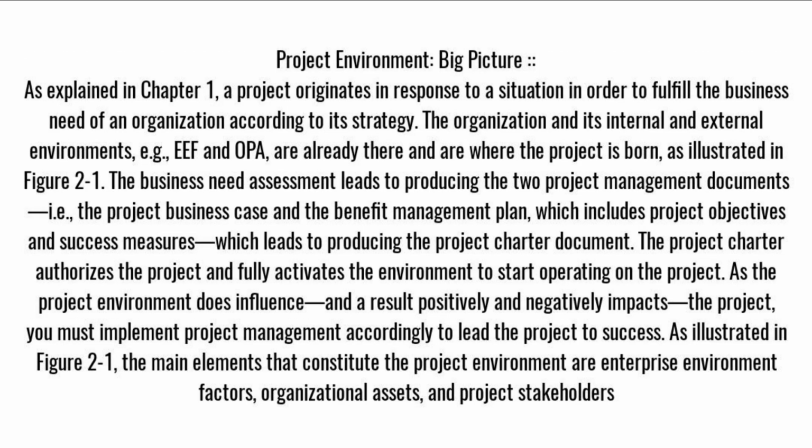Project environment, big picture. As explained in Chapter 1, a project originates in response to a situation in order to fulfill the business need of an organization according to its strategy. The organization and its internal and external environments, for example EEF and OPA, are already there and are where the project is born, as illustrated in Figure 2.1. The business need assessment leads to producing the 2 project management documents, i.e., the project business case and the benefit management plan, which includes project objectives and success measures, which leads to producing the project charter document. The project charter authorizes the project and fully activates the environment to start operating on the project.